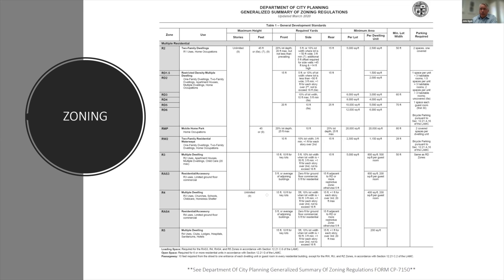Typically, we only have one level of subterranean parking, but we try to avoid it. If we can do on-grade parking, that's more efficient. And then at times, we'll have one level of podium deck where the building is raised up by one level of concrete construction. When we go outside of those parameters, our experience has told us that the project ends up having negative financial construction impacts. So if you have two levels of subterranean parking, that tends to be difficult unless your unit count is significantly higher. And the building types that we work on are typically between 55 to 100 units. So with two levels of subterranean parking, you're looking at a building type that would be 150 to 200 that might make sense.